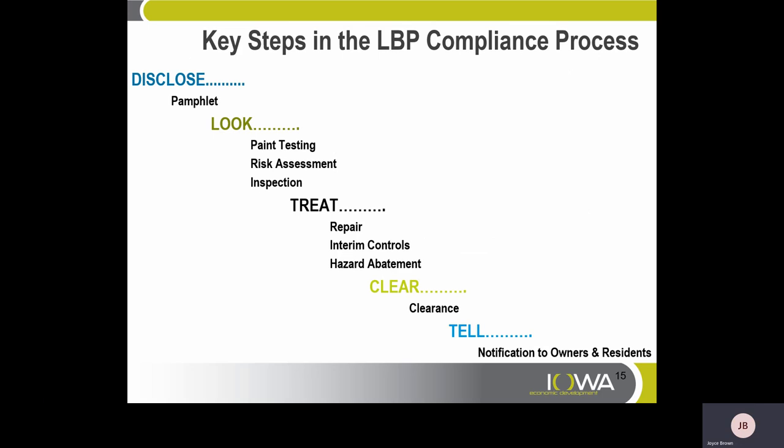Key steps in the lead-based paint compliance process: disclose, look, treat, clear, and tell. To disclose, you must offer a pamphlet. To look is to do paint testing, risk assessment, or inspections. To treat is to repair interim controls or conduct hazard abatement. Clear is to conduct clearance. And tell is notification to owners and rehabs of the results.